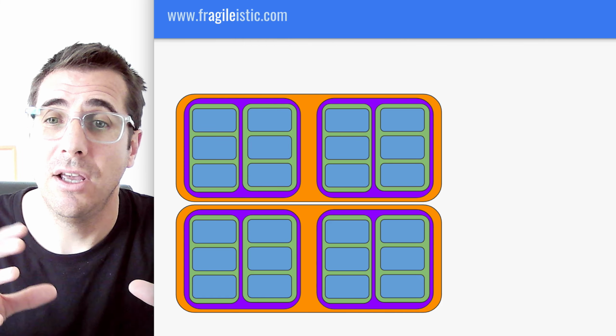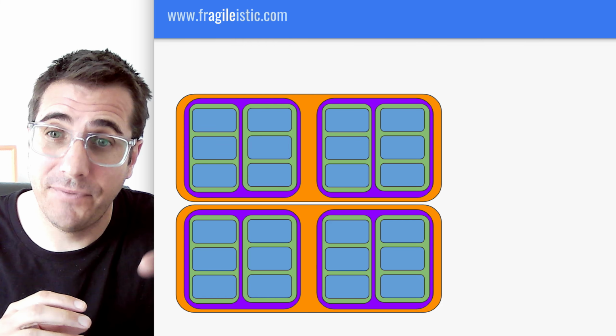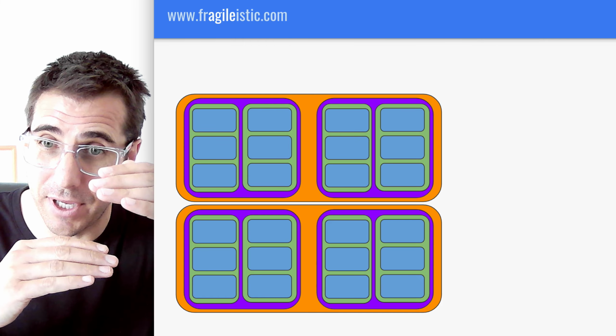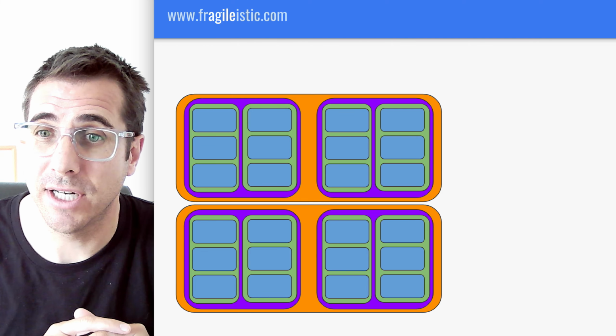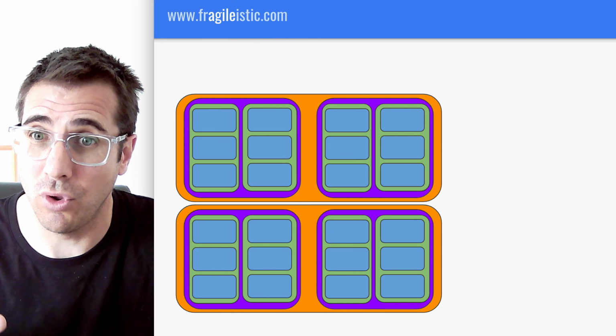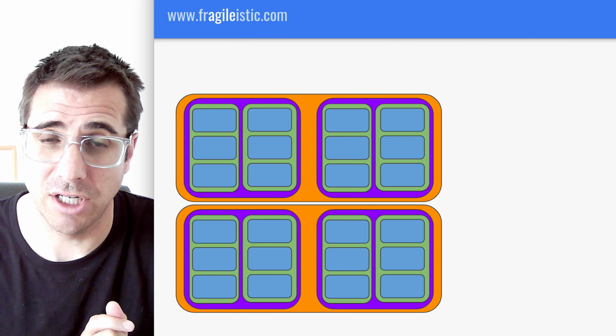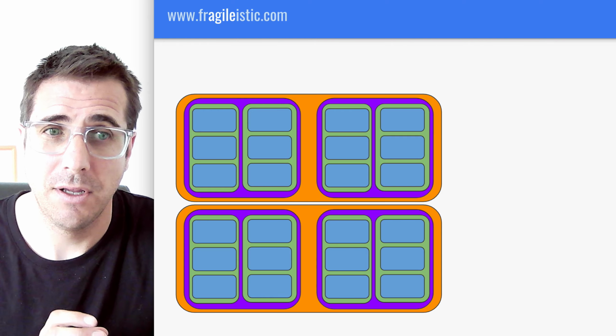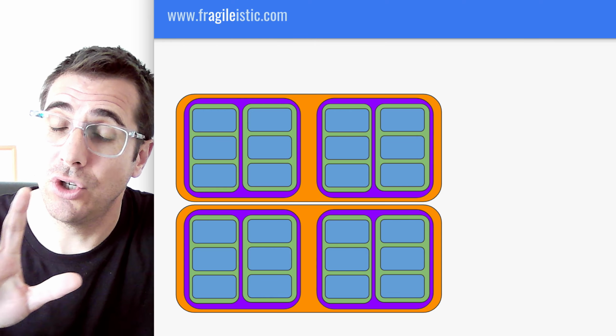You start to say, well, actually, we're going to wrap our features, those top level things, into something else called an orange item, which in Azure Boards is called the epic. And it's the epic that's shared across more than one team. Even the features can technically be shared across more than one team. So the system in Azure Boards allows you to do that.